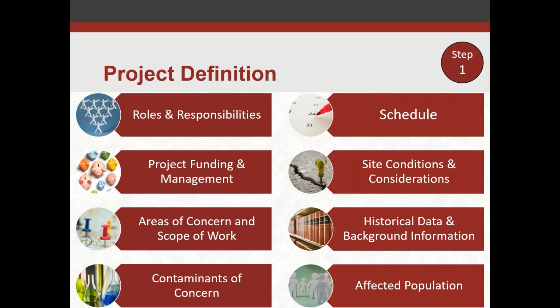So you want to make sure those are all accounted for for that type of facility. If you're doing a demolition project, you can imagine there's going to be a little bit less stringent requirements and restrictions. You may not necessarily abate and remediate all your hazardous materials before you demo the building. Some things may be left in place and you demo it in place. So you're saving some effort there. But again, it goes back to what's going on at the facility and who's the affected population. That's going to help decide how you plan for those remediation activities.